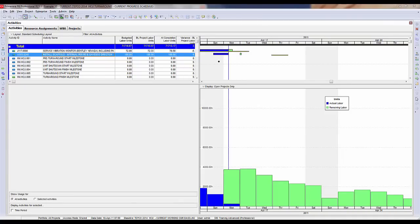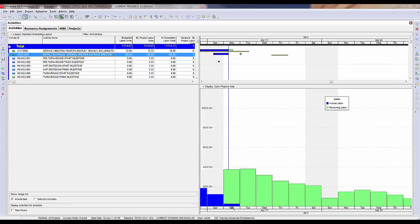I spoke earlier about using resource shifts on the timescale. Right now the timescale is set to show by day, and the data date slices down in the middle of Monday because the data date is set to 7 a.m., while Monday runs from 12 a.m. to 12 a.m. Tuesday. The histogram below has a bar that is partially green and partially blue — the blue is progress achieved from midnight to 7 a.m., and the green is remaining work from 7 a.m. forward. When the data date is offset, it slices down the middle of the bar, which can be confusing.